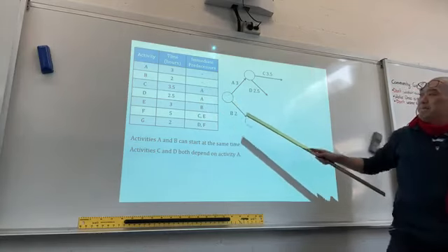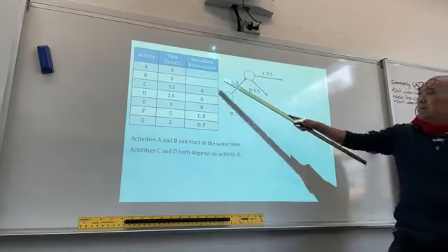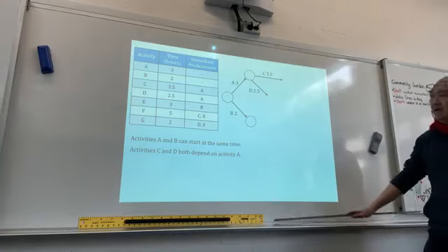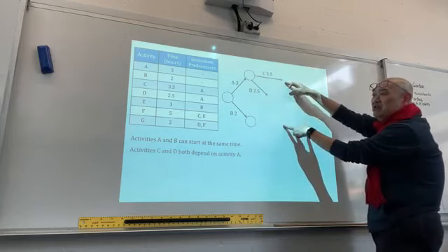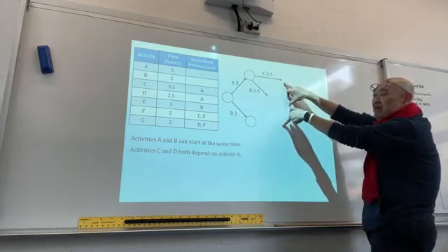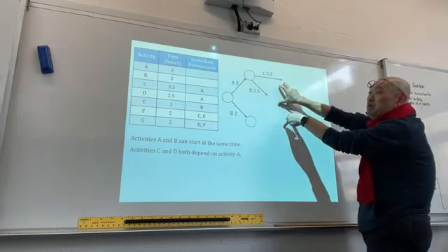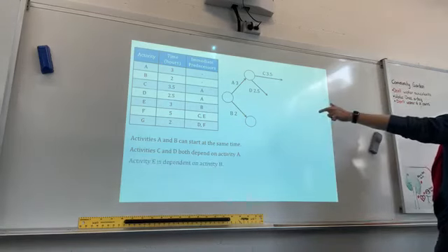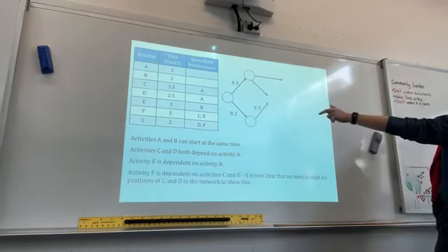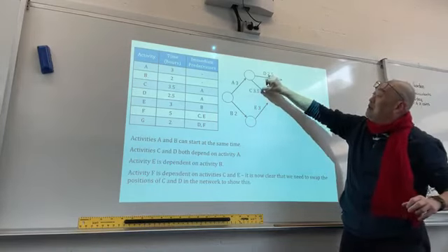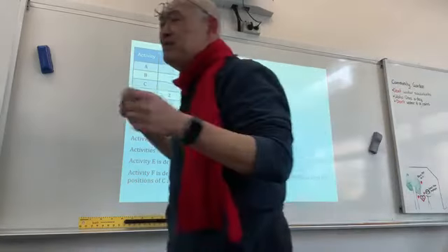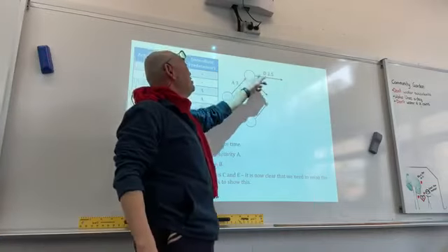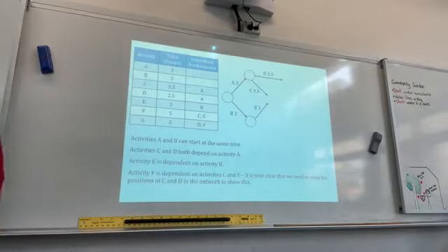So if you draw B, after B is E. All right? So we could draw E out, but then C has to connect to C and E. It's the predecessor of F. D is not. So perhaps it is better to switch both of them around, so that you see that you can connect C and E to F. All right? So sometimes when you have a situation like this, I would actually use a pencil first and then rub it off and fill it in to make sure that you can draw the network properly.